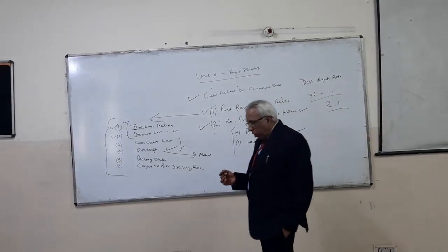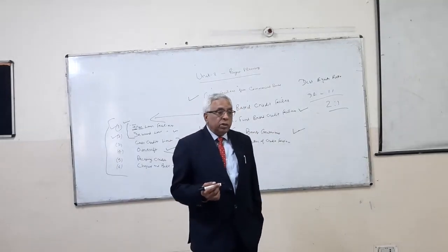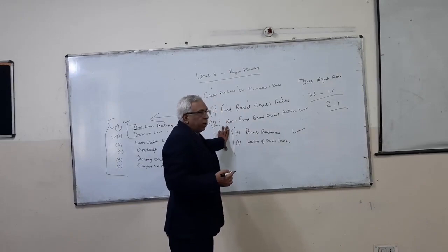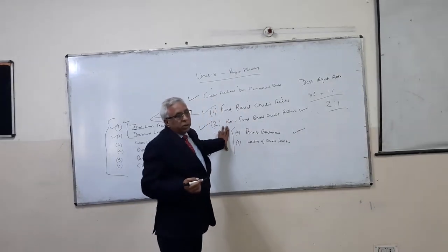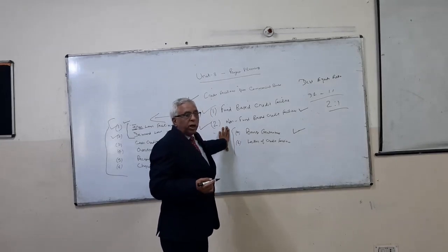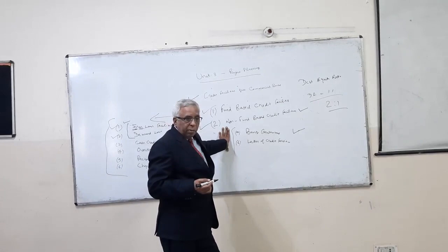The issuing authority like MCD, government departments, ask you to furnish a bank guarantee so that they can award you the contract. Under bank guarantee, a bank issues a letter that such and such customer is a reliable customer,